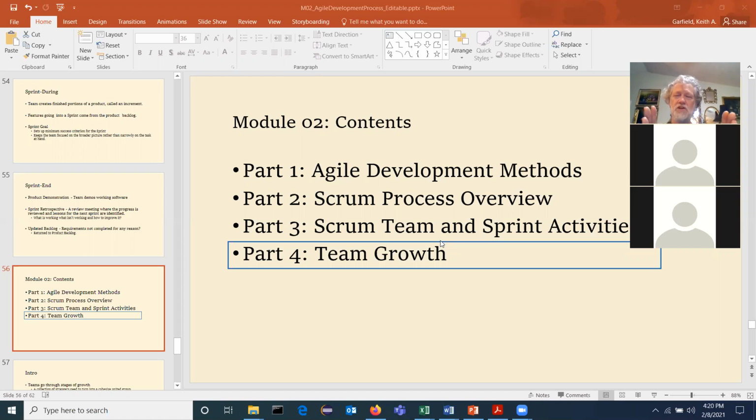And that becomes the real yardstick. So you say, okay, I've got 50 user stories. These are 50 features of the software that we want to have. And 40 of them are composing the minimal viable product. And you run out of time at the end of the semester and you've gotten 42 of 50 done. That's good. You met your goal. 40 was the goal, the minimal goal.